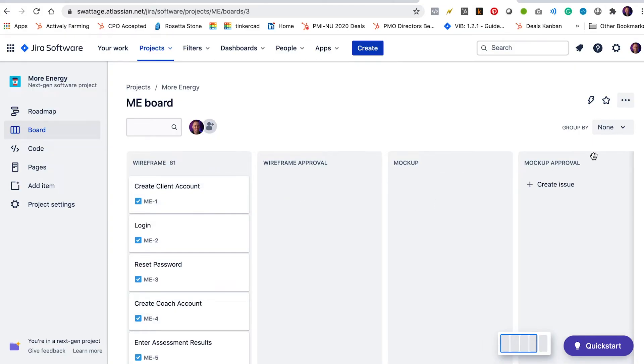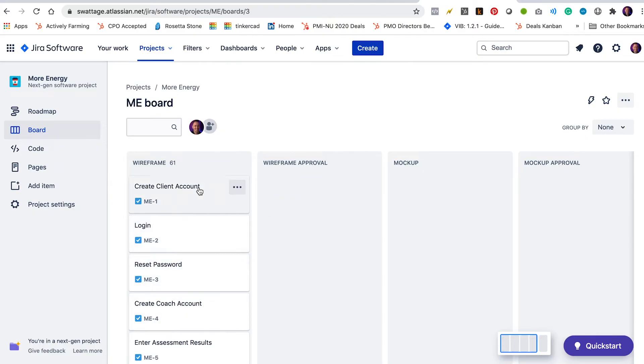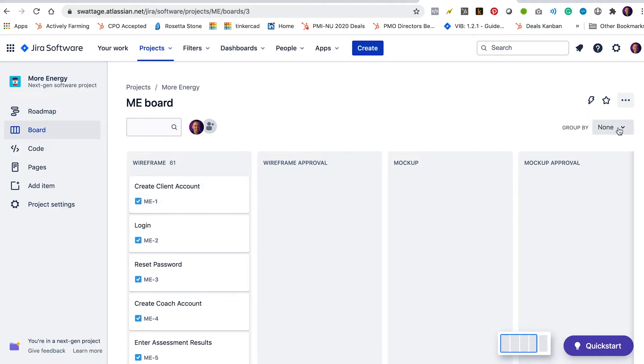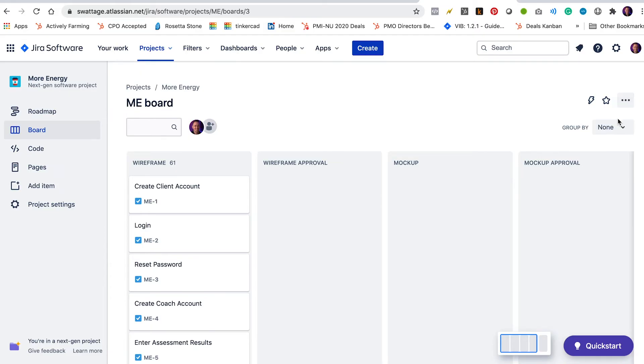So now that I've got my board set up with my issues and I've got my people added, what I want to do is I want to create some rules. So everything, for example, under wireframe is going to be assigned to Dimitri. And every time there's an issue that gets moved into wireframe approval, I want it to be reassigned to Michelle. So what we're going to do is we are going to add some rules.